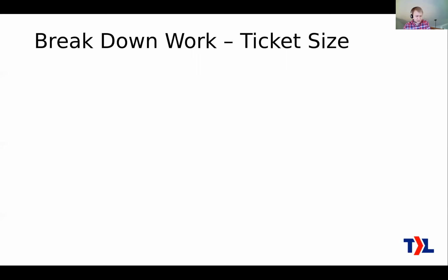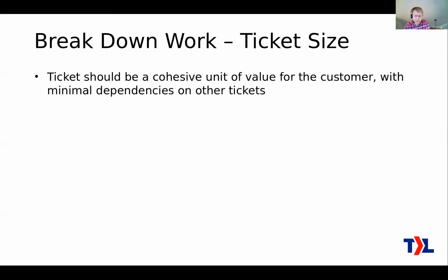Talking about the ticket size. This is where a lot of people don't really know how to do this very well. Generally people end up with tickets that are too big, although from time to time you can see ones that are too small. A ticket ideally should be a cohesive unit of value and minimize the dependencies. You should be able to deliver a ticket and then tell the customer pretty clearly, okay, now this bit of work is done. Doesn't mean the whole milestone is done. The project's not done, but ideally they've got something that they can look at and say, okay, we're moving ahead.